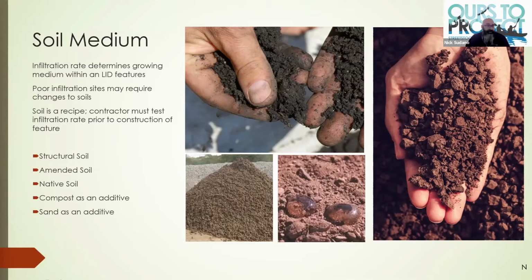For the contractors out there, realize that you are putting engineered soil in that follows a recipe. So if you put it in too early, you're going to need to protect it. Because again, it's one of the things that we're finding as a common issue, especially during punch list phase. And we'll have some slides later on to show this. But if you use that feature as a detention basin, which you shouldn't be, you can start to influence the design intent of this soil.